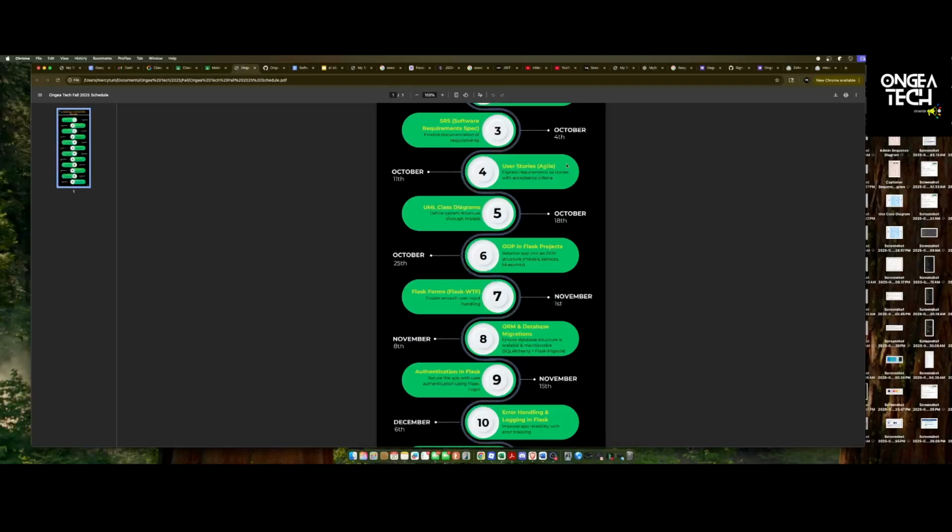First of all, you collect requirements. Once you do that, you do analysis. Once you do that, you review. It was step by step. Once one step was done, that was it. You can't go back. And that brought a lot of issues in case things changed in the future. It made it really hard to adapt. So agile has resolved that issue.